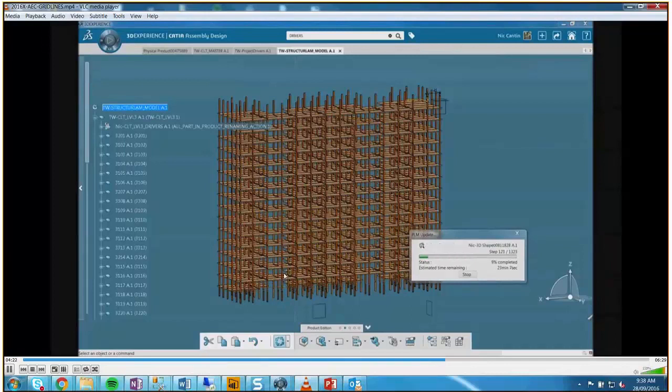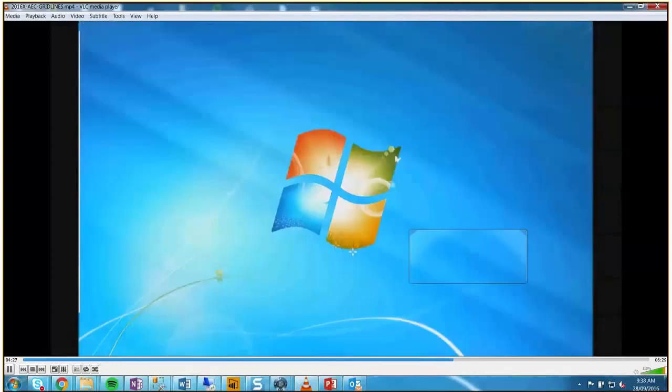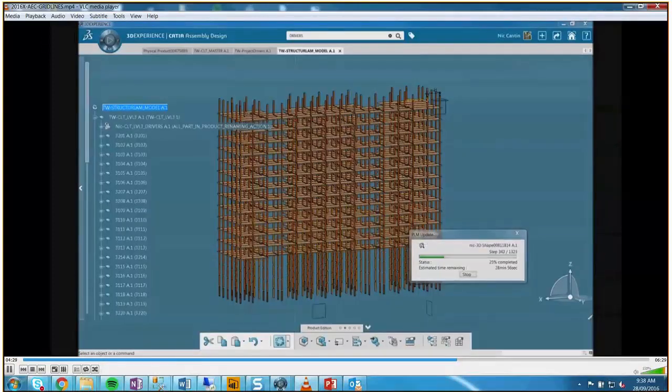Yeah, and it came up in the simulation part too, where we used Dalmia to work through the whole installation process, where the whole thing with this project is speed. They didn't want, every time they got to rig a panel on site, to try to find the most optimal place to rig it. We wanted to give all that information so the panels come off the truck as fast as possible under the crane, and they get thrown into place like a Lego kit.